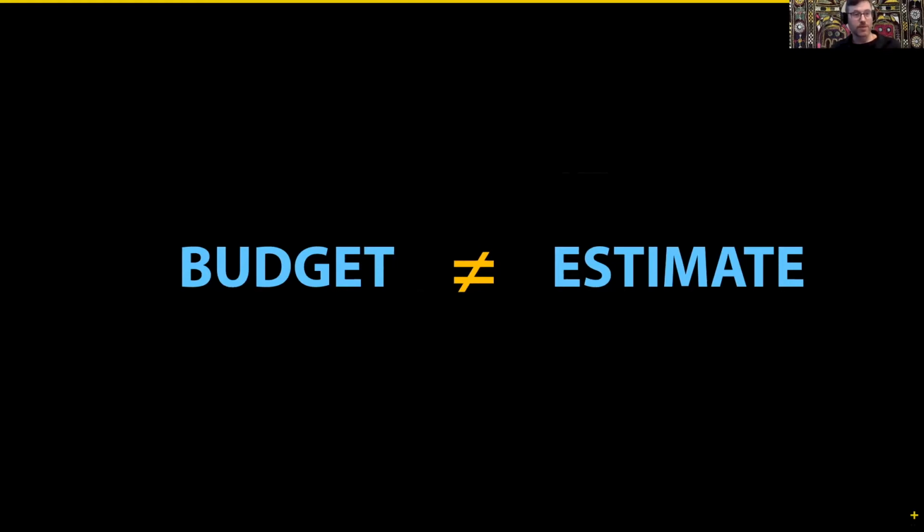So one thing that happens when we're defining your projects is we're looking at how much we think this thing will cost. Well, let's look at some historical data. It looks like this project is going to cost $20 million. Okay, well, let's apply to government. That's an estimate. Okay, so then let's apply to government and some other agencies, and we'll get them to give us some money. And they say, okay, we're going to give you $20 million, but not a penny more. Now that's a budget. It's a budget based on an estimate. But the estimate is inaccurate because you haven't really started the project yet. You haven't really gotten into the details. So that's why projects tend to go over budget, because usually the amount of information that's available at the time that we're all asking government for money is not adequate.